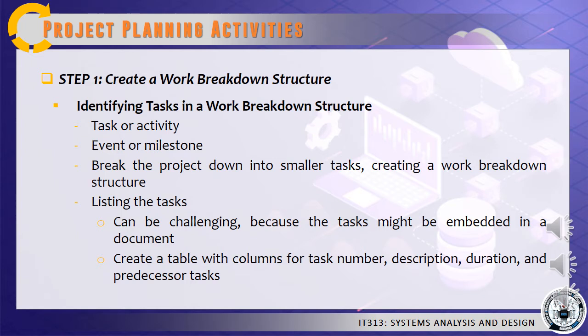After the briefings, send out customer emails and burn sample DVDs. When the emails are sent and the DVDs are ready, load the new software. When the marketing materials have arrived and the software is ready, do a dress rehearsal.